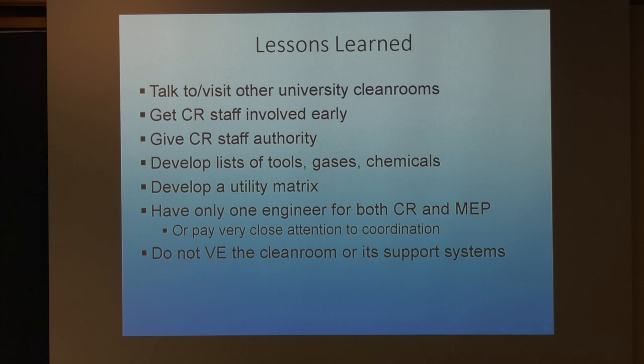As Dennis mentioned, you have to make sure that pipes meet each other inside and outside the cleanroom. There are no conflicts and so on and so forth. And very important, do not value engineer the cleanroom. You heard me saying amen at some point this morning. When I went to UD, the architects and engineers were telling me, Iulian, all these great things you want, they were somewhere on the drawings. They got value engineered out.